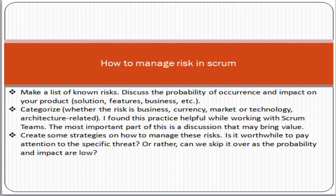First, you must make a list of known risks, then discuss the probability of occurrence and impact on your product or project solution. Categorize them — meaning you must categorize what category each risk belongs to, such as high, medium, or low. Then create some strategy or solution for how you can manage those risks.